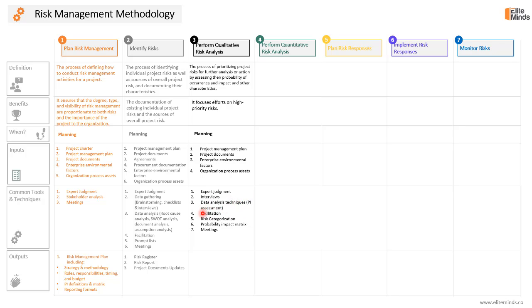Additional tools for qualitative risk analysis include facilitation for conducting interviews and sessions, risk categorization, and the probability and impact matrix — the most important tool to prioritize project risks — in addition to meetings. As an outcome of this process, project documents will be updated including the risk register, risk report, assumption log, and issue log. The key outputs of the remaining risk management processes will be updates to the risk register and the risk report.